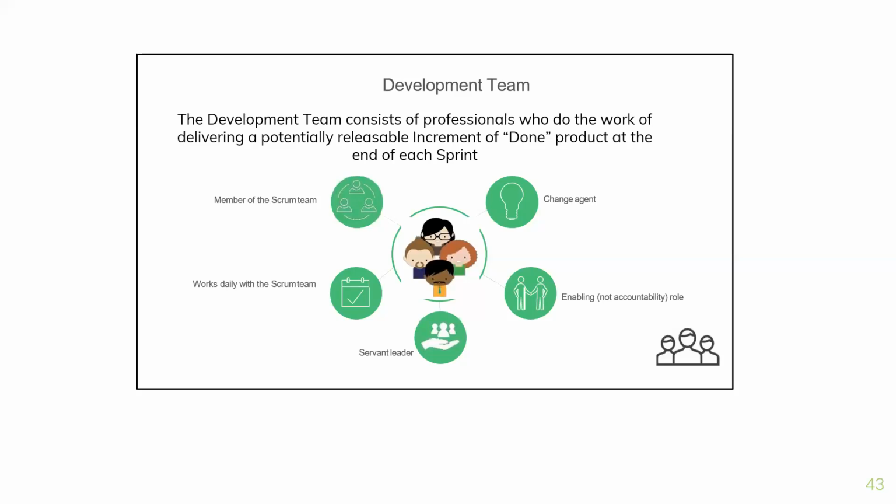And then 2 weeks down the line, you go to your tailor's shop for fitting, right? And you see that what I ordered versus what I got, there's a very, very big gap. That's what we mean by definition of done. For you, the definition of done is it must fit me and it must align with the design or the picture that I have sent to you, and the requirements that you have sent. She has taken your measurements, and all of those measurements must be intact. That's what we call definition of done in product management or in Agile.